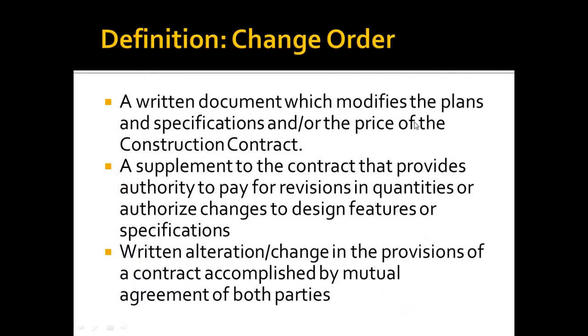Definition: a written document which modifies the plans and specifications and or the price of a construction contract. The key word there is written. I think a lot of people unfortunately do verbal change orders, which will lead to some problems, particularly when it comes time to collect money.